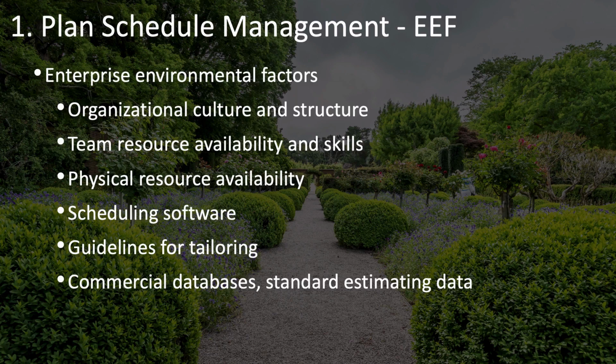You should also factor in team resource availability and skills. For example, how much lead time or notice do you need to provide in order to get the resources you need? And when you get those resources, can you have them full-time or only part-time? Can you have them long-term or only short-term? All of these will affect your resources and your scheduling. And the same goes for physical resources as well as for team resources.